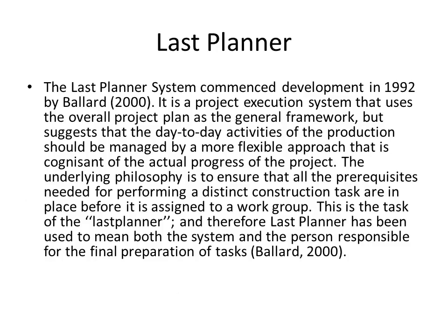Now, we could use the last planner, which is a system that's mentioned somewhere in the case, a way of scheduling what's needed at the last chance you get rather than at the time you thought it was going to be wanted. So the last planner is an approach which can get around some of the problems of project planning.